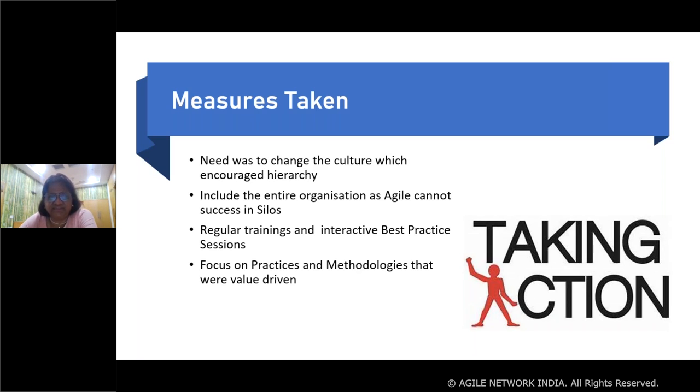We are the servant leader. To inculcate this kind of culture, we started having regular trainings and best practice sessions with the team. We broke up the team into smaller groups. Once a week, we have our best practice sessions where everyone interacts. They discuss the challenges they faced, and then they go back and implement it in their projects.